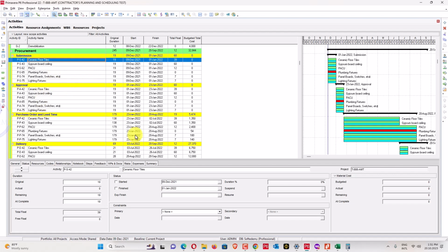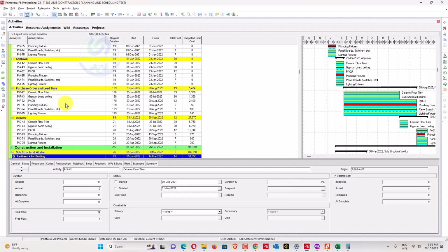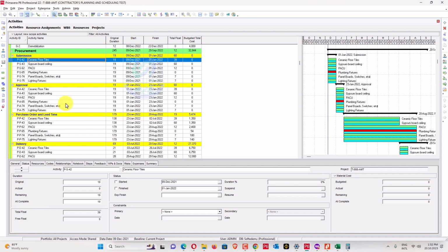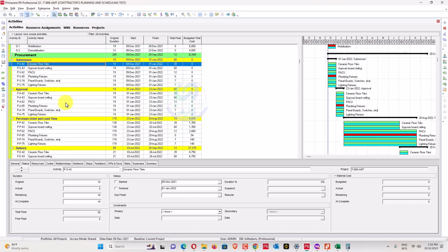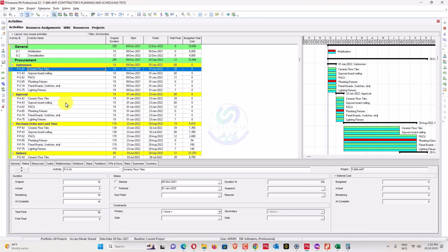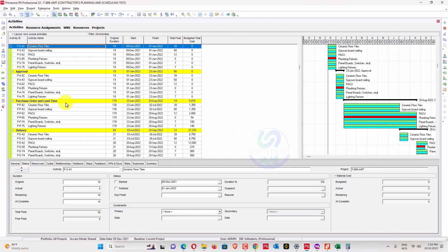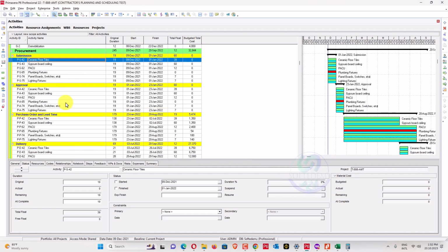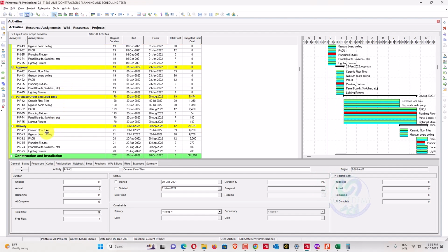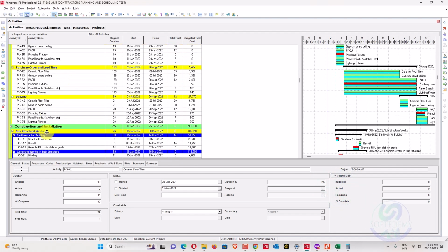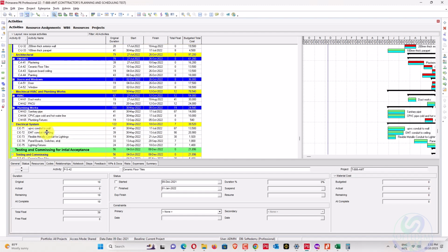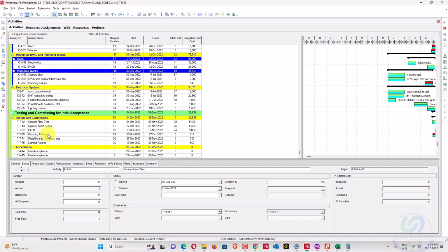I can update the progress, like we can update duration-based progress for procurement also. If the process has been done, we can update the duration percent complete also. It's very meaningful. This can be divided into weightages, and the Excel sheet can be maintained. We can get the status data from our procurement department and the site team, who are receiving the delivery for inventory. We can also get installation, testing and commissioning.